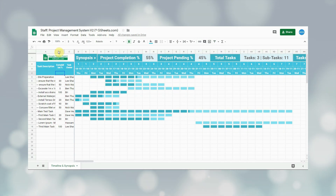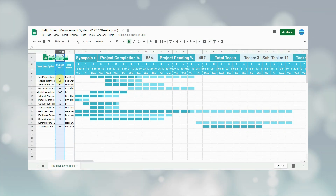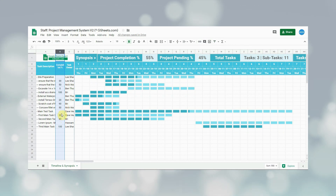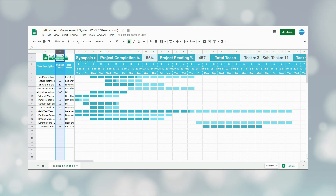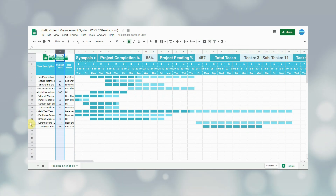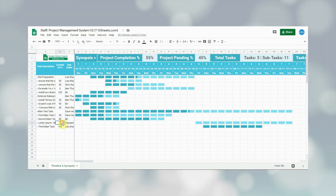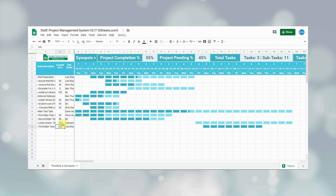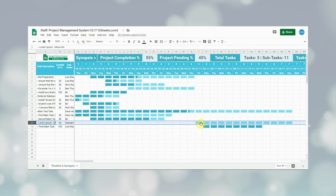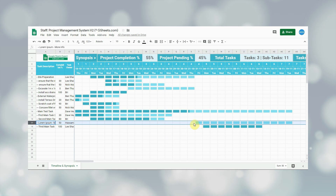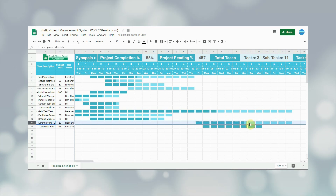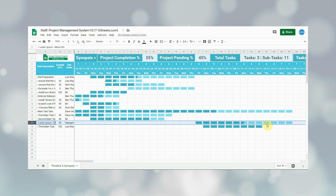The second purpose of this sheet is to update the completion percentage of tasks. Each staff member uses this sheet to update the completion percentage of the task assigned to them. Once the staff updates this percentage, the timeline updates automatically and changes color according to the completion percentage. For this demo, let me update the completion percentage of the 'Lorem Ipsum' task added earlier to 50%. Shortly, 50% of the task color will become dark cyan and 50% will remain light cyan — and as you can see, the colors have updated.